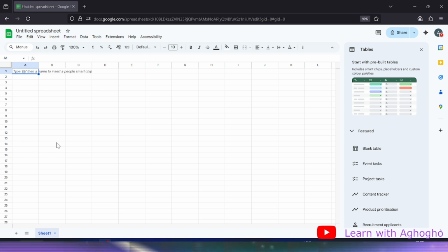So, in the course of considering these activities, you will have to measure the likelihood and the level of impact, which are considered in qualitative analysis. These are just based on your own perception or research of what impact level that activity will have on the project if it occurs, and the likelihood as well.